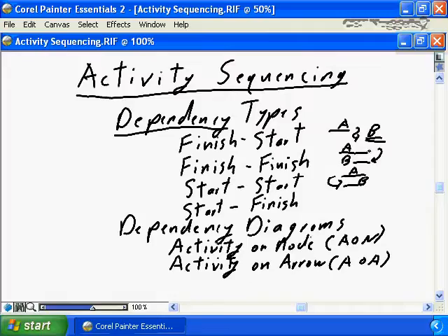Often used where you have a series of tasks that will finish and result in the combination of a milestone for a phase or component for your project, where the final tasks for the phase would have a finish relationship on the milestone itself. A similar style of dependency is a start start, where you're saying B cannot start until A starts.